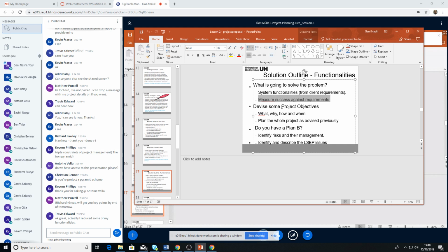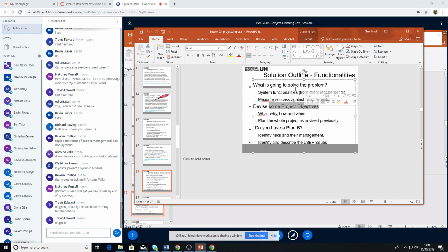So, project objectives. As I said, after you get the functionality right, this is where your project planning starts. Here you say, I know what I need to build. Now where do I start? Then you go home, sit at your desk, and set aside some project objectives, and you say that the goal is to build the artifact. But that's a mouthful, because go on and build it then. You can build it in 1 hour. So that's the goal, to build this. And then you divide that into 5 to 7 milestones.